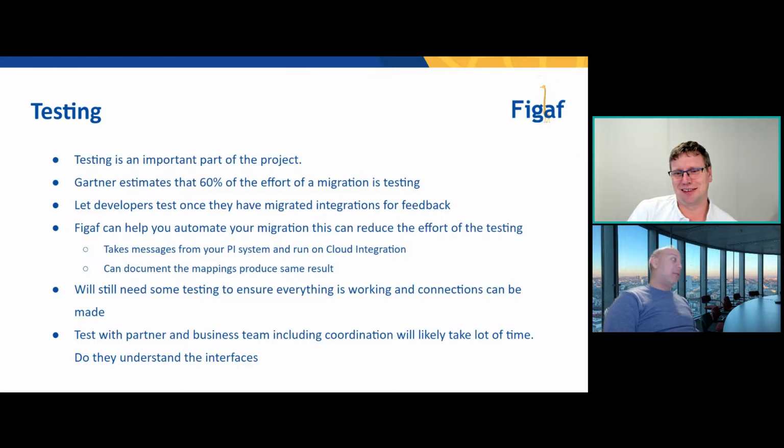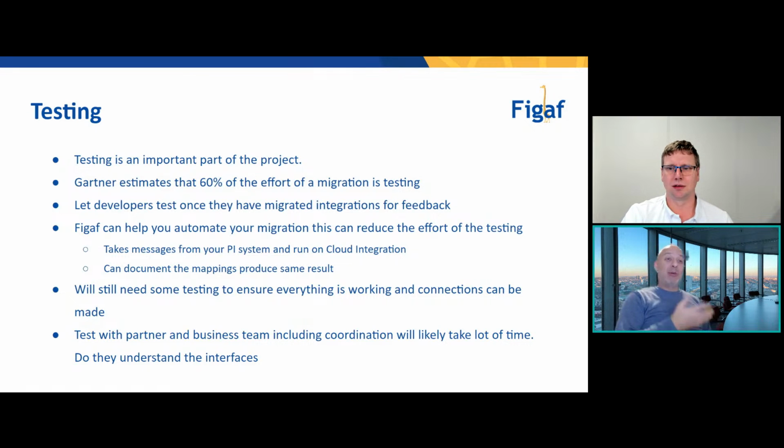Exactly, and I think closing those loops, making shorter what is called feedback loops, is essential for continuity of the program. And a migration project has all the elements to reach a high level of automation, right? Because you have all possible scenarios in your productive environment, and it's a question about building your test cases out of those scenarios, right? So make it a test-driven migration project. I think that's a very big asset for these projects.